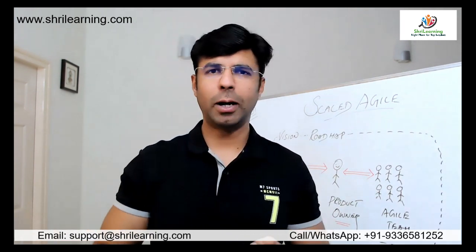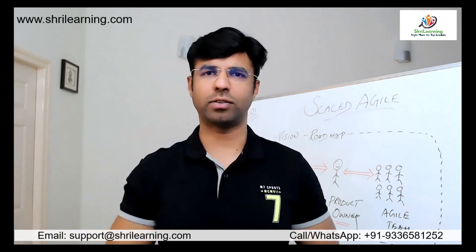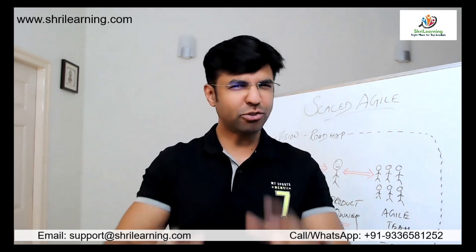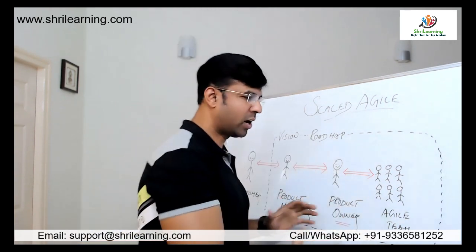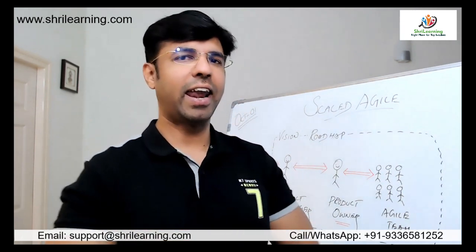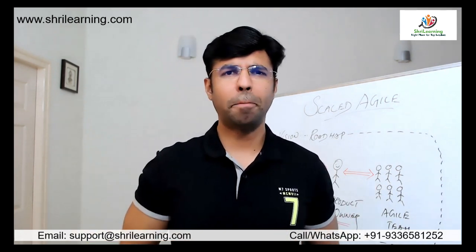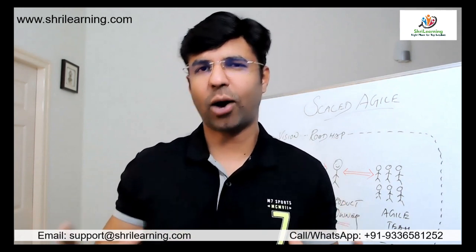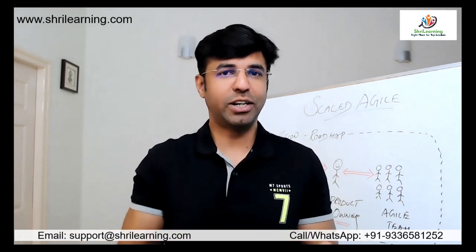Now, this role plays a vital part in prioritizing team backlogs. We have a backlog for the team to work on in our iteration. Somebody has to prioritize it, right? How do you prioritize it? The product owner, understanding the needs and necessity of value delivery, starts prioritizing this. Prioritizing is one part of it. The other part is elaborating the requirement to the team. It's a very important role. You have to elaborate it so the team understands it.